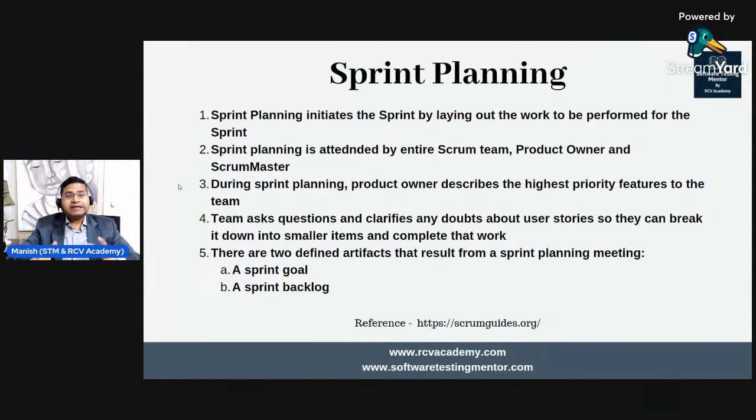It is not as in the waterfall approach, where the delivery happens after a year, 6 months or 1.5 years. In Scrum, or in agile software development approaches, an iterative, incremental approach is followed. So in Scrum, the sprint is a 2 to 4 week cycle, and mostly the standard is 2 weeks. You pick the work items from the backlog that are ready for build, start building them, developing, testing, and everything happens in that 2 to 4 week cycle.